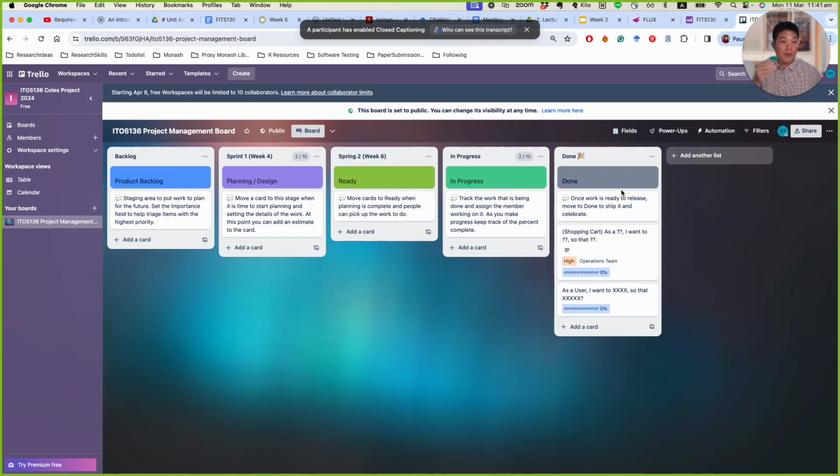But is it really done? Done means the software is implemented correctly and complete. But is it well tested or not? Is it checked by someone else? Is it deployed yet, or do we just leave it there? So it's different. Acceptance criteria is the step of how to test that user story.